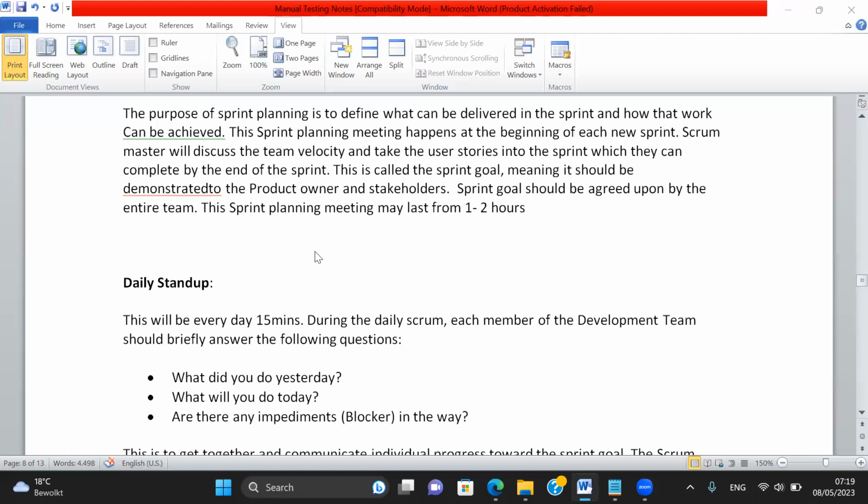So in the planning, the first thing is to find the team capacity. That is also called team velocity. We have to find the team velocity. Why? To do the planning of the next 2 sprints. Is that clear? So in sprint planning, the Scrum Master will lead the meeting and he will know the availability of each and every individual. And then he will think, okay, how many people are available? Then they will decide how much work they can take. Okay. Is that clear? Yes, sir.